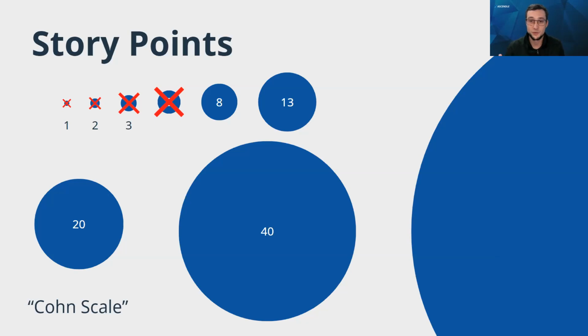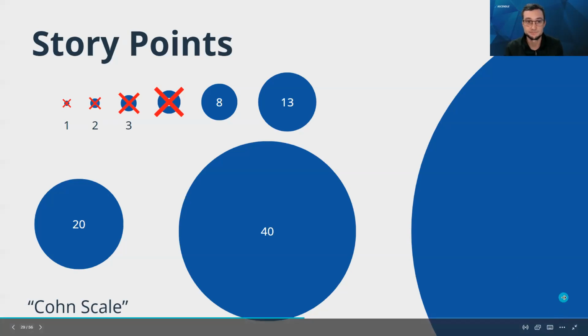But if something's bigger than a 40, it's probably so unknown, it's really not going to be accurate to estimate that. How do we know if it's a 40, 100, or 200, which can drastically change your estimate? So trying to get those stories that we talked about in a range in this initial estimation, somewhere between an 8 and a 40, is important to make sure we have some parameters around how we're going about it.